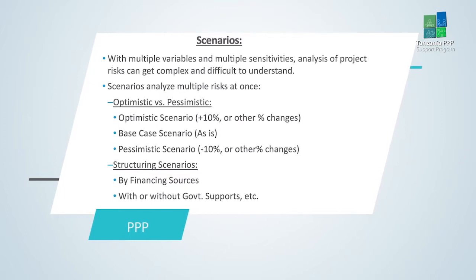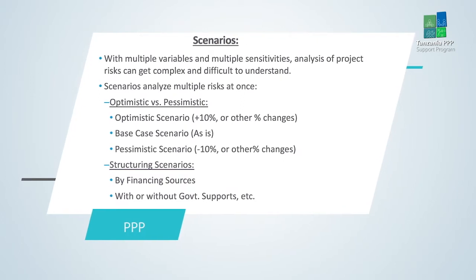Scenario analysis is saying that usually when risks or uncertainties occur, they don't have the courtesy in the real world of occurring just one at a time, right? It's not the case that everything is the same except revenue is dropped by 10%. It's usually the case that there are multiple risks, or when things go bad, they don't just go bad one at a time.